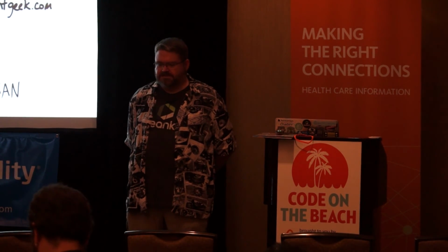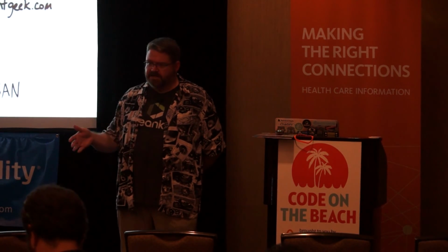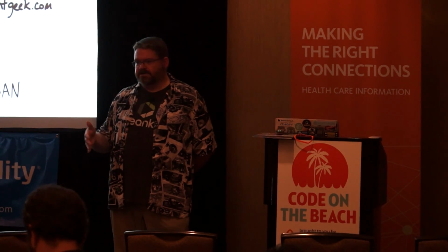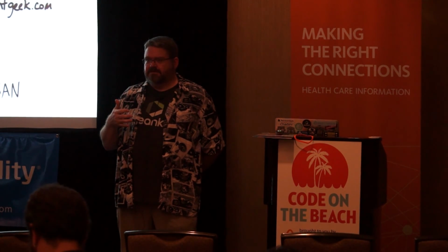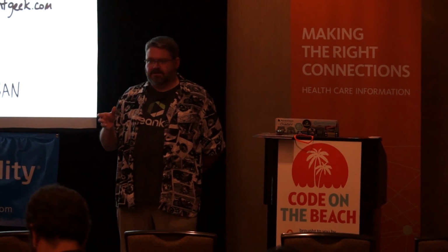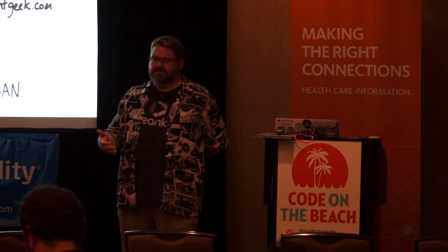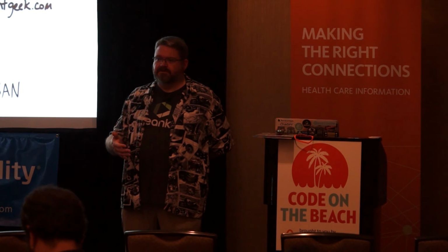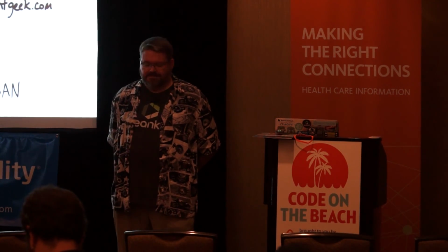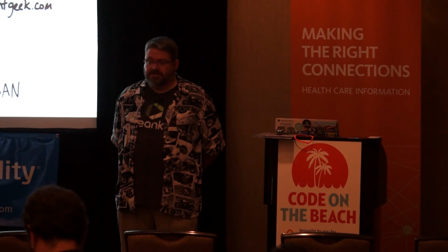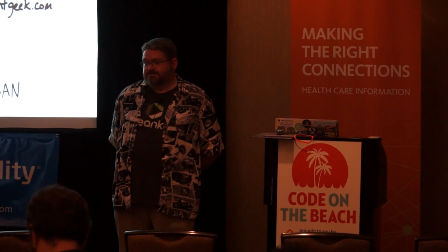And some of these tools will also give you the ability to play what-if scenarios. It goes through thousands of simulations to figure out how long it's going to take you to finish all the work that you have. And then you can try things like limiting work in process, or what would happen if we added a member to this team? How much more time would it save us, or what kind of impact would that have on getting the work done? So it's a magical tool. It's really amazing. It's so magical that people don't believe it, but it works.